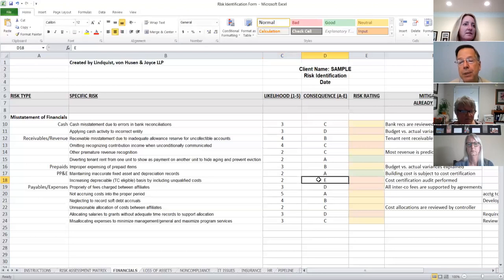If I decided the consequence was not E, but instead kind of a minor consequence, if I made it a 5, so highly likely, but the consequence is B, we didn't go red. It wasn't until the consequence becomes a D probably? Yeah. So a D consequence, it becomes now red. So that's how the form works.